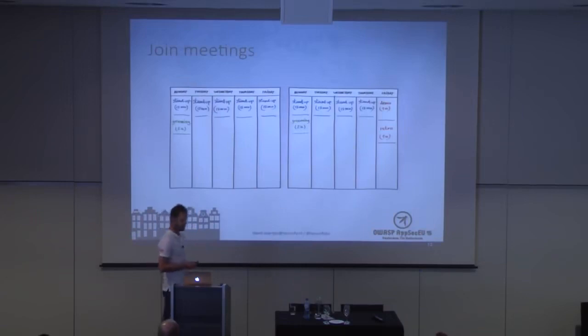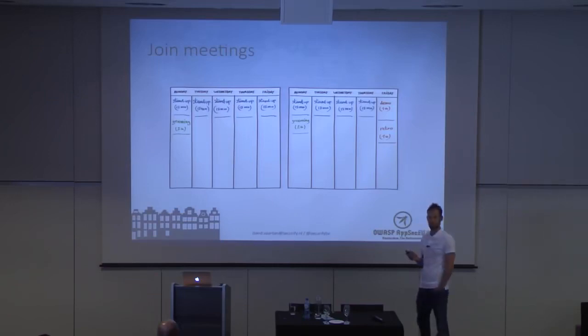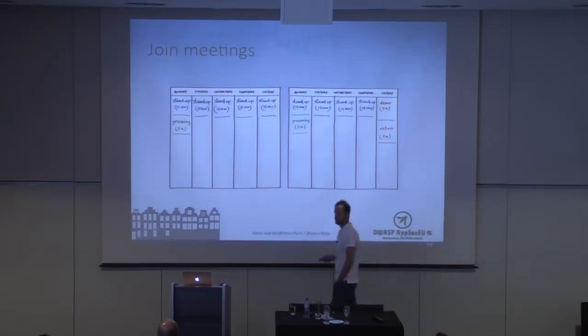So the first thing I did, because back then I was a complete Agile noob, I didn't know much about Agile and how this team actually worked, so I studied Agile and started to join this team. This was basically their schedule. They had a daily stand-up every day. They had sprint cycles of 2 weeks. They have a grooming session at the beginning of each week and a demo and a retro at the end. So I just started to join them here and there.